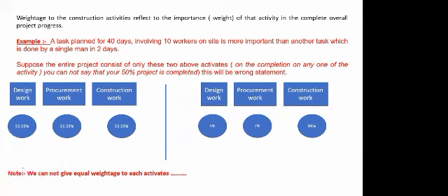वो समझो। अगर आपने ऐसे वेटेजेस दे दिए होते और मैं बोलता कि I am a client and I am asking you what is the progress of my project, and let's suppose you haven't started working on site till now, you have only done the design part and you have only procured the material, you haven't started the excavation on the site itself, but later on if I ask you the progress, you'll say it's something around 67%, which is nonsense. You cannot have 67% of progress, right?